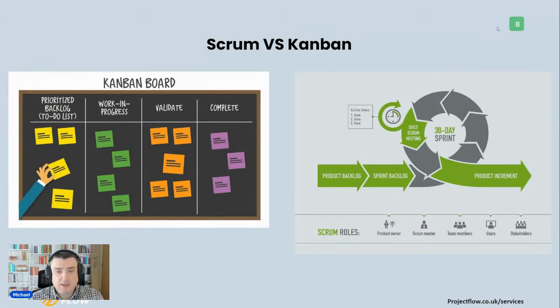And the main principle of Scrum is to deliver the project in small chunks, as we're saying. So we've got sprints, and the most common length I think is 2 weeks, but it doesn't mean you have to use 2 weeks. In some teams you could work 1 week sprints, some teams you could work 4.